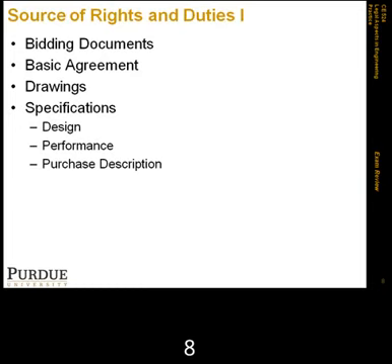Finally, purchase description specifications basically designate, or tell, the required products that need to be bought. Sometimes they tell the contractor to buy from an approved list, and sometimes this increases the cost of the work, because contractors can otherwise find alternate products. But where you need very specific products to be incorporated, you want to go ahead and create this purchase description specification.